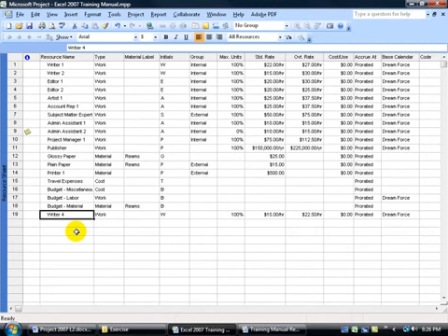Now before we move any further, let's go ahead and click Save. But before I click Save, Project is going to give us a warning. It's going to say, okay, of all the resources, remember that the pool takes precedence. So if I have an extra resource here that's not from the pool, and I click Save and click OK with the update, because it wasn't originally in the pool, it's going to remove it from my list here, because when it matches and compares, what's not in the pool shouldn't be in here, so if there's any extras, it's going to delete them.